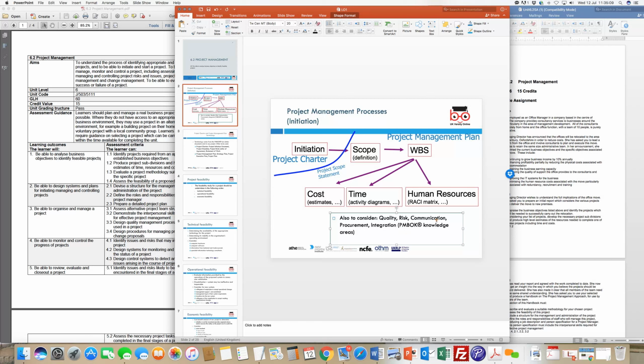So work-based structures, we typically see that we break it down into things like costs. We want to know what is the cost of planning this birthday party, in terms of catering costs, venue hire costs, decoration costs, gifts costs, things like that. You look at timelines, because the birthday, say for example, is on the 1st of August, you're looking at a timeline wherein how many days before that date you will have to order the birthday cake or a dress, and those kind of things will come across and define time.